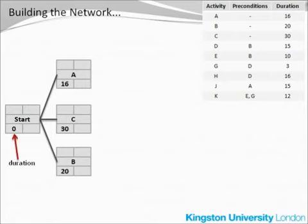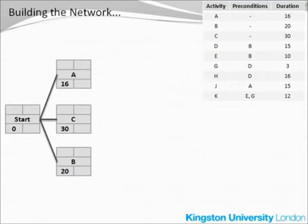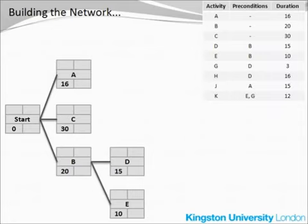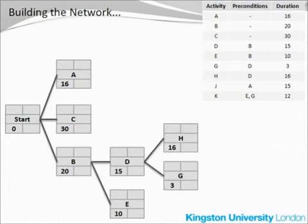We also put the duration into each of the activity boxes. For the start node it's always zero; for every other node, the values can be easily found in the table. Now we are ready to move on to activities D and E. According to the table, the precondition for both of them is activity B, so activities D and E will follow immediately after activity B. There is no activity F — the letter F is often omitted to avoid confusion with the letter E. Let's move on to activities G and H. For both of them the precondition is D, so they simply follow activity D.